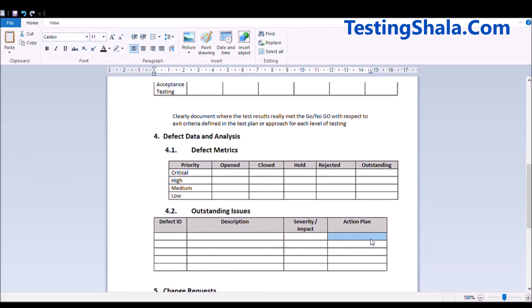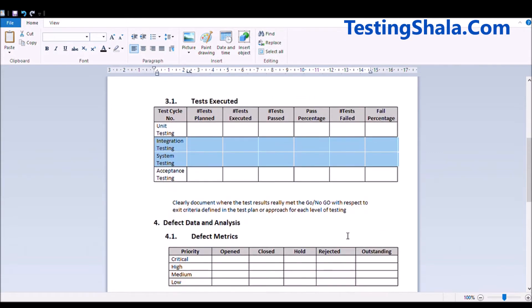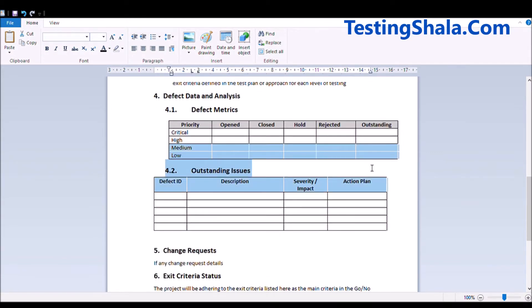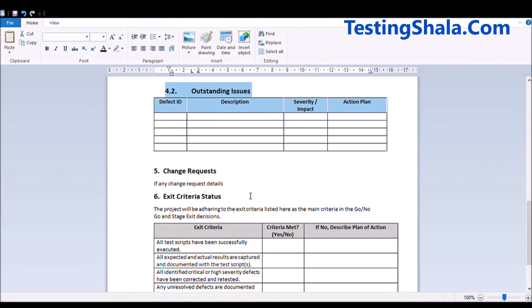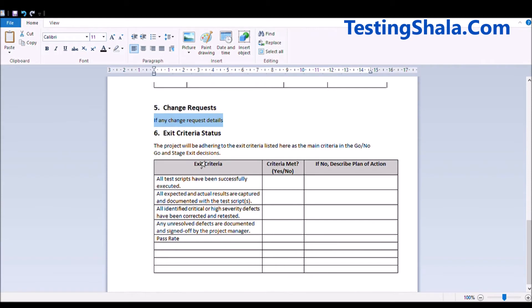That would give a clear indication to stakeholders of where you stand in terms of test case executions and outstanding defects. You should also provide any change request details if required — especially when you are not in a position to meet the schedule. The last section is the exit criteria checklist.